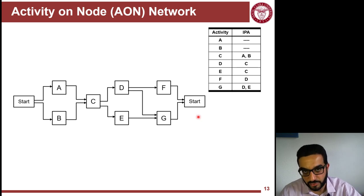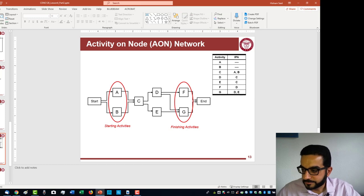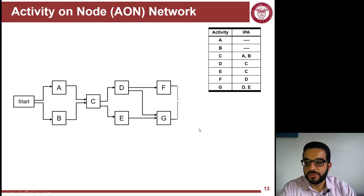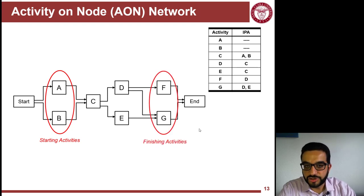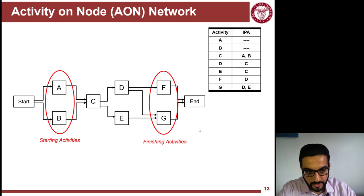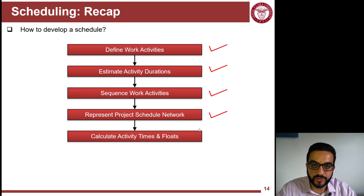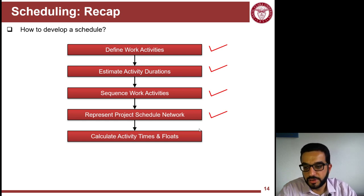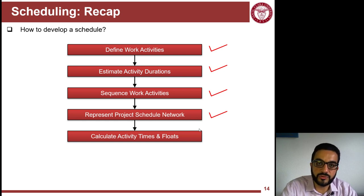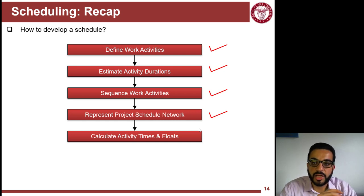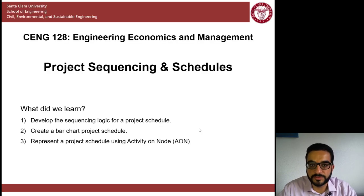So, we have a Start node and an End node. A and B are starting activities with no predecessors; F and G are finishing activities with no successors. We've now covered sequencing concepts and factors, and how to represent the schedule as a network using bar charts or activity-on-node. The last step — calculating activity times and assessing schedule criticality — will be covered in the final video of this lesson. Thank you and take care.